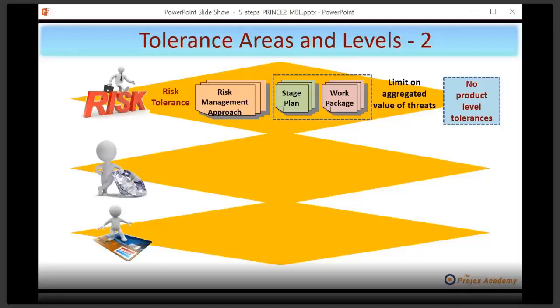Let me just give you a little 101 on risk management. How you define a risk is something called its severity. Is the risk severe or not? And the way in which you come up with severity is you multiply the probability of a risk occurring times its impact. So if you said to yourself, there's a 10% chance of rain tomorrow, but it's okay, I've got an umbrella, then obviously that's a fairly not very severe risk. Would you agree? And the converse would be true as well. Now, what's this word aggregated?